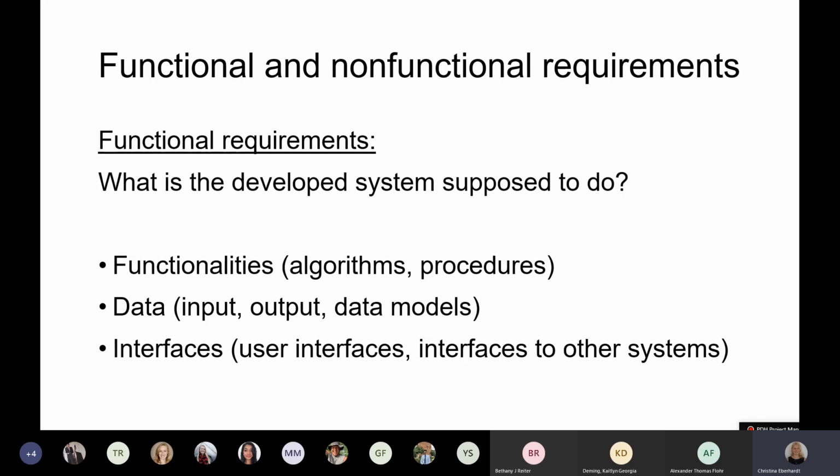So for example, we have a module A and a module B that will interact together, but we'll be developing on both at the same time because we want to save time. So it is really important that we declare beforehand how exactly we are going to merge those two together to have a functioning product in the end.